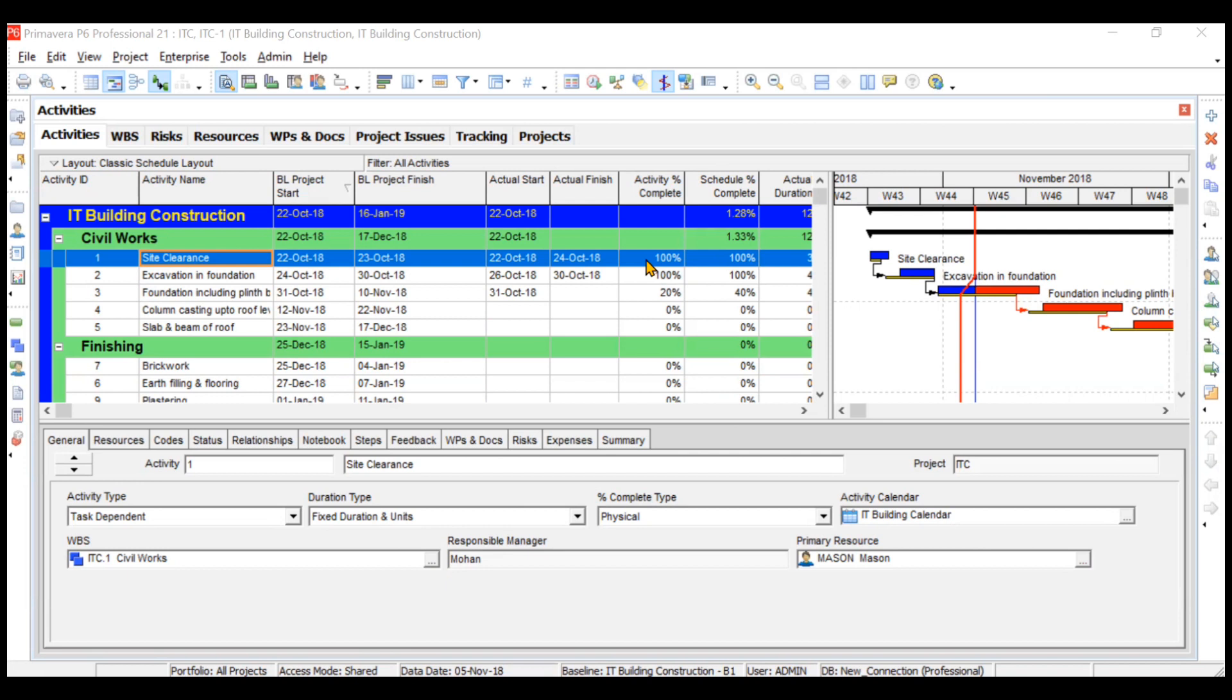These can be overheads like water and power, rental expenses, welfare expenses, or maintenance. These are called IDC costs—indirect costs or overheads. So how to take care of these costs? You can add these costs for the respective activities using an option in your detailed view called expenses.